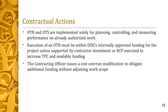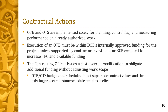However, if the resulting EAC exceeds the current funding or authorization levels, the federal project director must decide whether to de-scope the contract or seek additional funds by executing a baseline change proposal (BCP) to increase the total project cost (TPC). An OTB in excess of the authorization does not constitute an Anti-Deficiency Act violation, but the federal project director must take action to prevent a potential violation. The estimate at completion (EAC) in excess of either the CBB or PBB, or in excess of the TPC, would drive the need for additional funding and may be used to start the process to utilize contingency or execute a BCP.